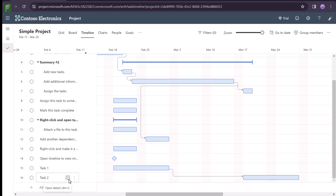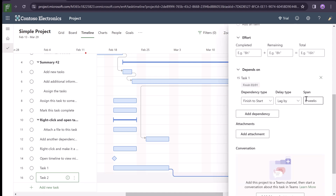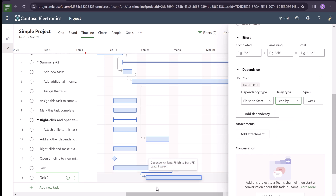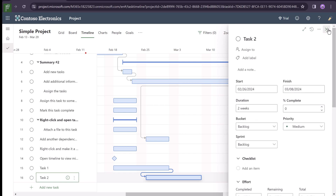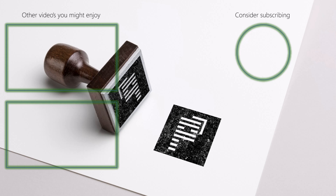We can also open up the eye icon or the task details page here. We can change that up — change this to one week and set that to lead time. Now you see that curling up really nicely with the second week of task one corresponding together with the first week of task two. I'm very happy that we now have lag and lead time in Project for the Web. I'm looking forward to seeing what the product team is able to do together with Planner for tasks as a whole. Let me know if you're excited about this new feature inside Project for the Web.